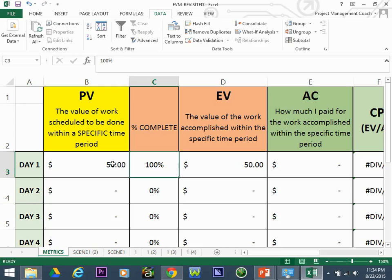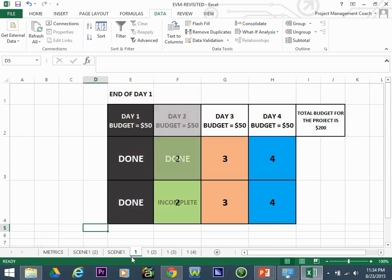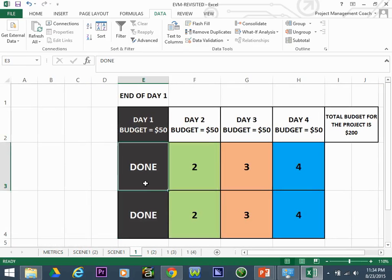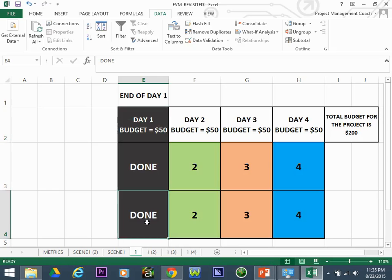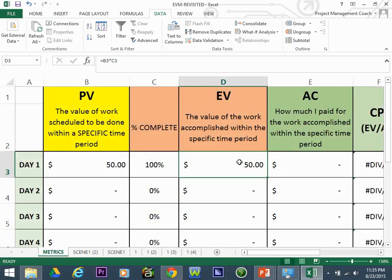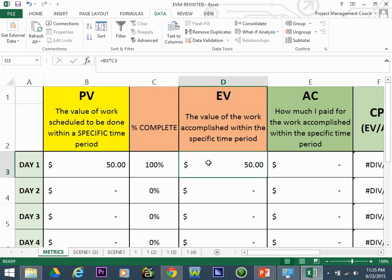So at the end of day one, we got both panels done — a hundred percent of the work scheduled. The work scheduled was valued at fifty dollars, so because we got all the work done, the earned value is fifty dollars. We planned to get fifty dollars done, and we got all of it done.